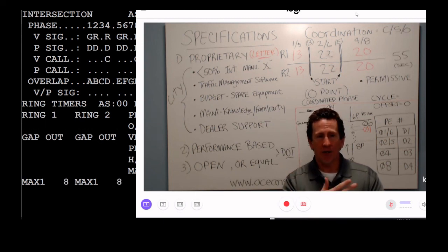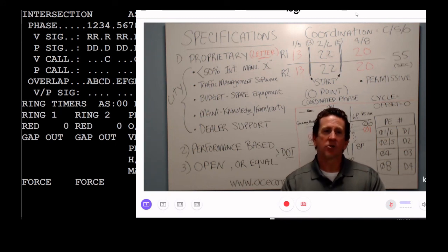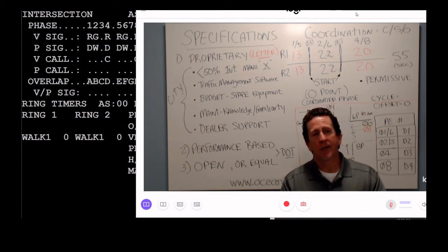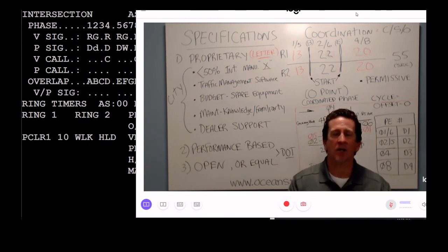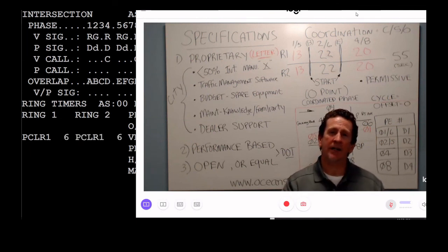Now they're going to recable the whole span because the span was falling down. So it's something they knew that they had to do. If they had budgeted properly, it wouldn't have been like a big hit like they're going to have to take. It's probably going to end up costing them $40,000, $50,000 to do that whole intersection. Maybe not that much. I don't know what the contractor has to do. But it was an unplanned purchase, and we try to get away from those unplanned purchases.